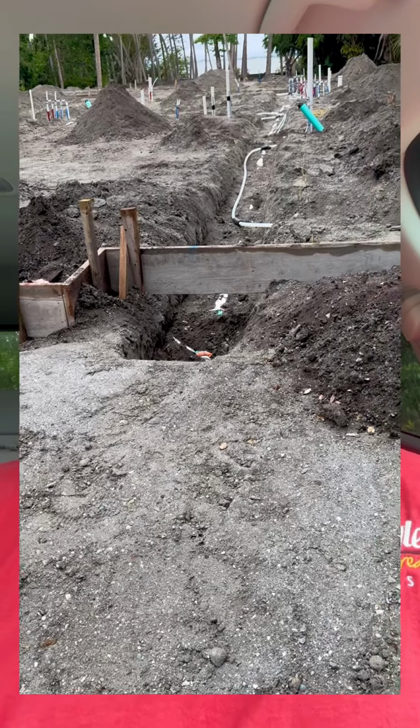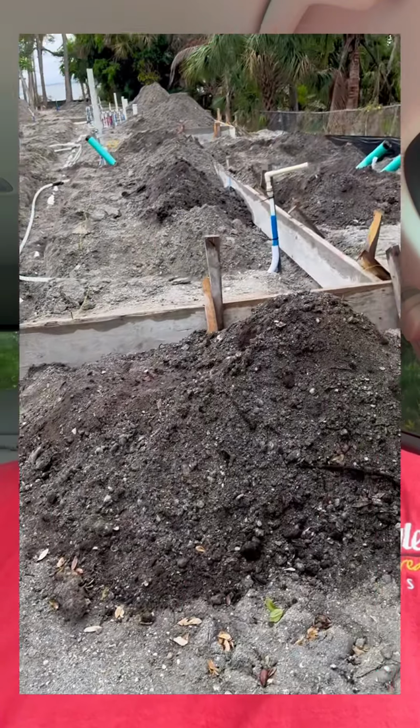Here's the catch. I've always learned that I can't always take someone's word for it. So I need to physically put my eyes on the material before notifying the masons. Once I see the material is on site tomorrow, I'll contact them and let them know they can move on their prep.